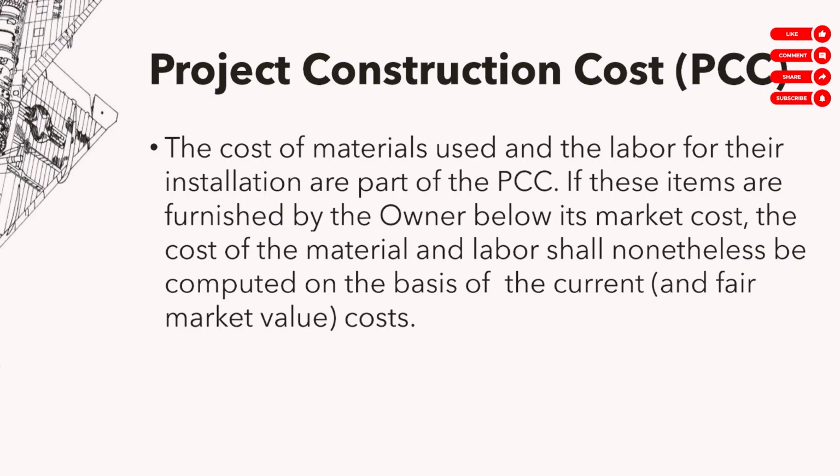So, mura nakukuha yung tile, yung yero, yung CHP. In other words, bababa yung PCC kasi daming discounts eh. Ang problem kasi with that naman is, the architect's fee depends on the PCC. It's a percentage of the PCC. So pag lumiliit yung PCC, lumiliit yung fee ni architect. Kaya lumiliit yung fee ni architect.